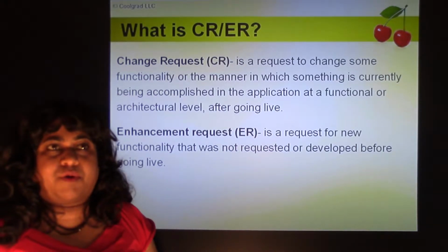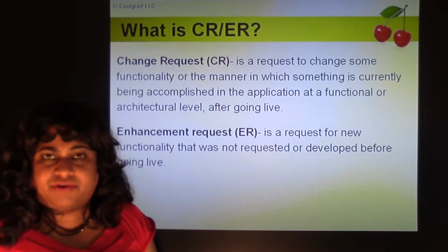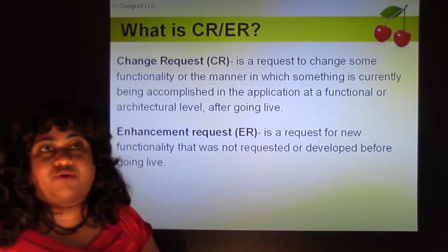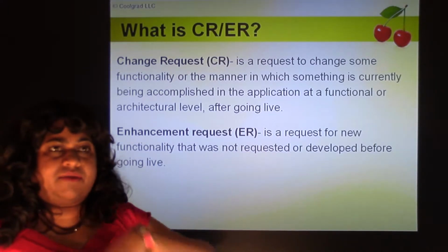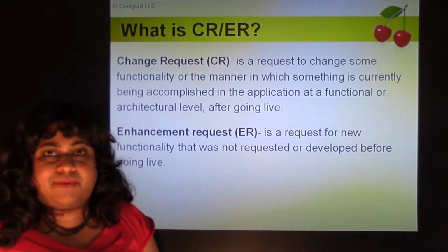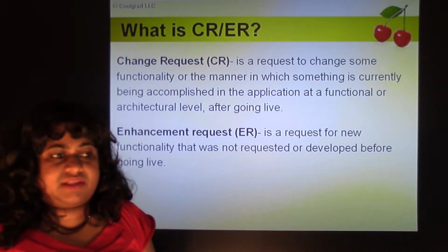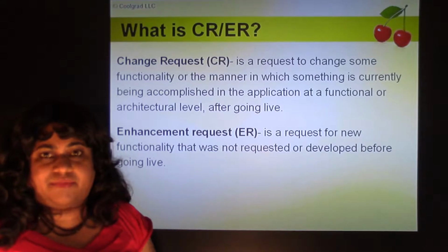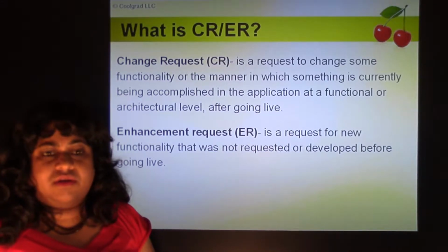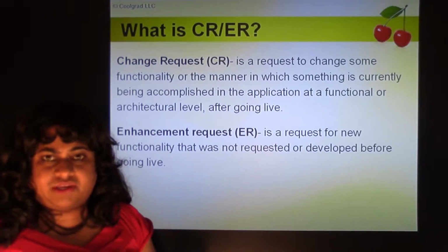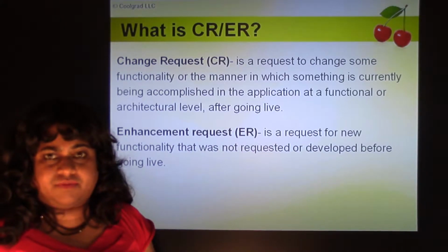So a lot of project managers who are young and inexperienced make this mistake often. They try to please the customer by going all out and giving him more than he asked for, but it might actually be something that the customer didn't want, or it might actually be affecting him negatively. So you have to get the scope of work frozen and deliver exactly what you agreed to deliver.